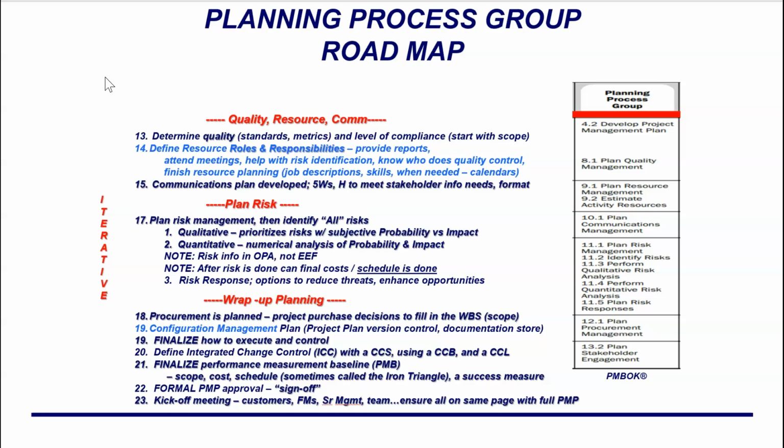And then, of course, in planning, I want to make sure procurement is a risk to me. It always goes on the risk register, that list of risks. And so are assumptions. Assumptions always go on the risk register. These are things assumed true without proof. And then, of course, finalize the plan. Make sure that it is all integrated, that I don't have more schedule or requirements, scope, than I have cost or budget to manage them, right?